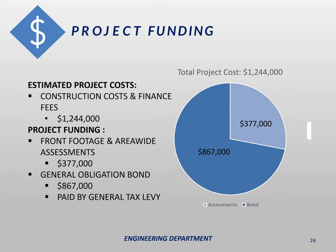When the city does projects like this, we typically get a lot of questions related to funding. We've estimated that the project will cost approximately $1.24 million. That includes all costs associated with construction and financing fees, and also includes deductions for the cost of MPS water main replacement work. The funding for this project comes from two sources: special assessments and general obligation bonds. Special assessments are expected to generate approximately $377,000, roughly 30% of the project cost. The remaining $867,000, roughly 70%, will be funded through general obligation bonds obtained on the open market, which are paid through the city's general tax levy fund.